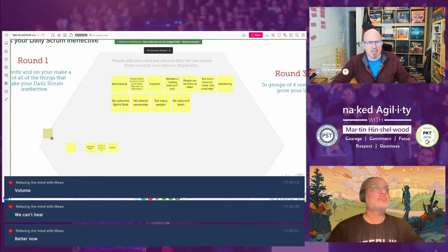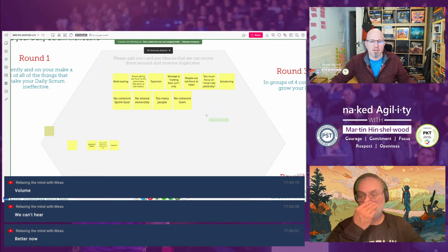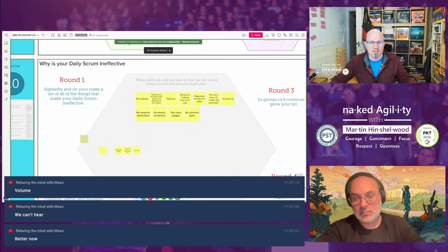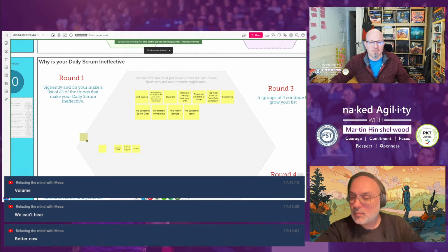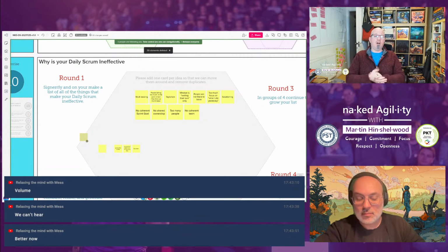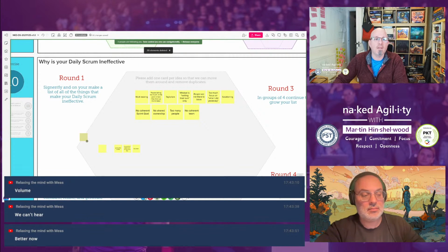Too much focus on what I did yesterday. Is the Daily Scrum there to discuss what we did yesterday? Is the purpose of the Daily Scrum to talk about what we did yesterday? To the extent that it affects the plan before the next 24 hours.